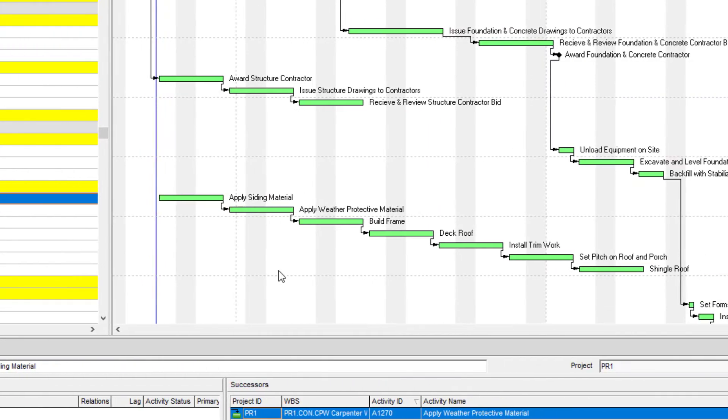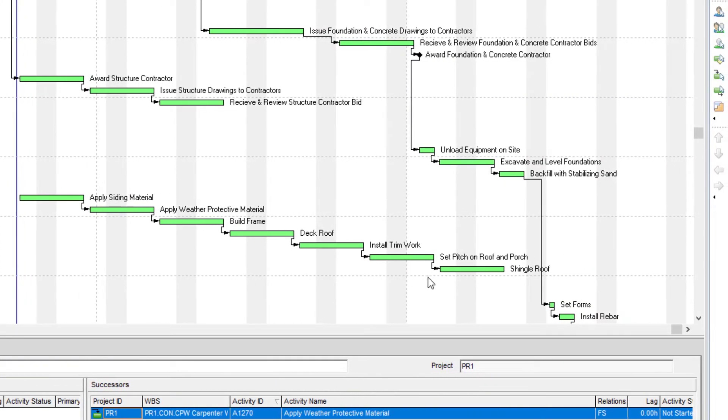So if we go down to this set of activities here, we can actually go into our Gantt chart and use the relationship lines that we have in here to remove the logic that we have tied.